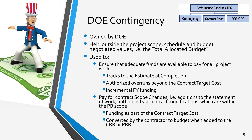DOE must ensure adequate funds are available to pay for all the completed contractual work scope. It tracks to the estimate at completion, which represents the best estimate for the final cost of the project, plus profit, fees, and other direct costs. Contingency funds are used to pay for overruns. DOE can also use the contingency as funding to increase the contract target cost, with budget and within-scope modifications to the current project statement of work.